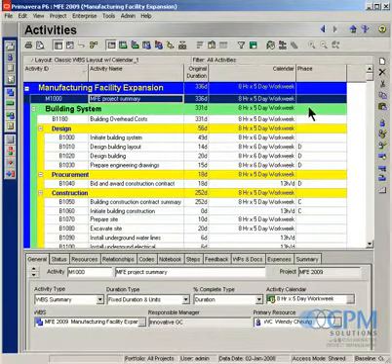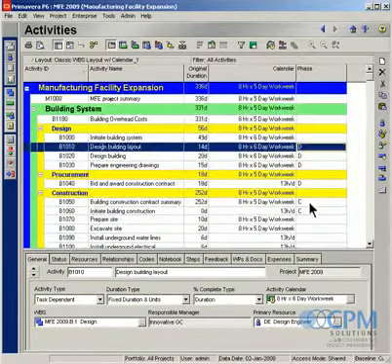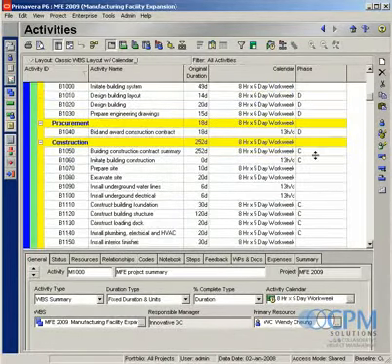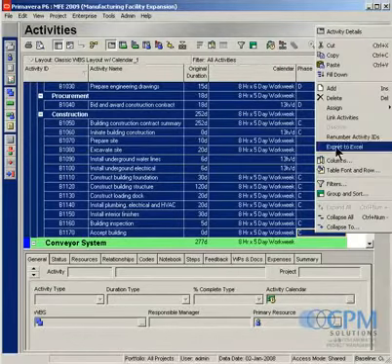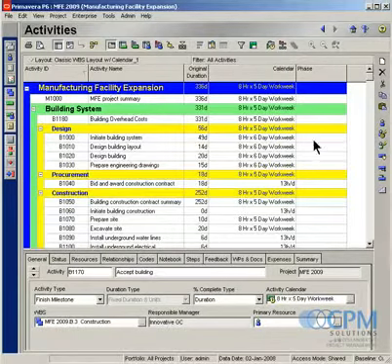But you know what? It's also a really handy tool to empty out fields. Here you can see I've got an activity code field called phase, and in some activities I've got an activity code assigned. You can also use fill down to empty out those fields. So again, I just highlight the field that I want to copy, which is actually an empty field, and I can go down here and highlight a bunch of activities. Again, make sure my halo is in that phase column. Do a right click and do fill down, and it quickly empties out all those fields.